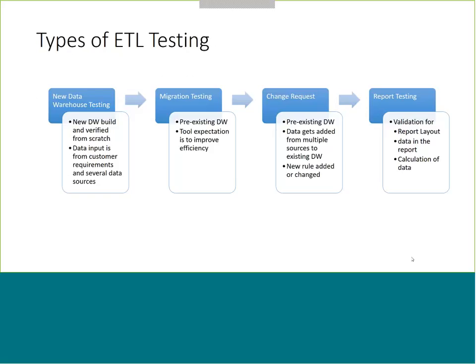There's actually a really interesting point about data warehouses: the person who's paying for it is the person at the end. So it's better to show them what the output is going to look like before you start doing the data migration. To do that, it's best to synthetically create the data in your dimension and fact tables, so it looks realistic. So your customer, your consumer, your trader is going to be able to say exactly what this system is going to look like. If you wait until you've migrated the data, then the chances are you'll be wrong and you've got to go back around that process.